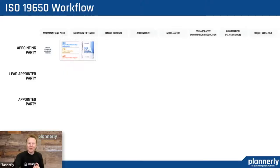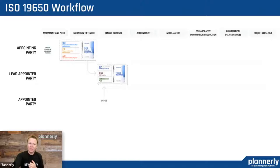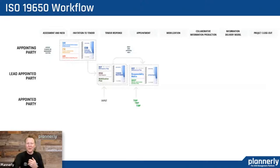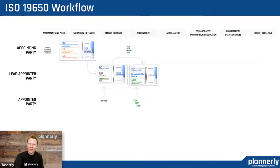Hopefully the appointing party has a group of documents that corresponds to an invitation to tender — this is the bidding process. Those documents combine into the exchange information requirements that we then get responses from the prospective lead appointed party. Multiple responses with multiple pre-appointment BIM execution plans, with potential risks and mobilization plans that form a tender response — with input from the potential task teams that that lead appointed party has. All of these terminologies are potentially very foreign to those just starting, but will be reinforced as you use the workflow and the templates.